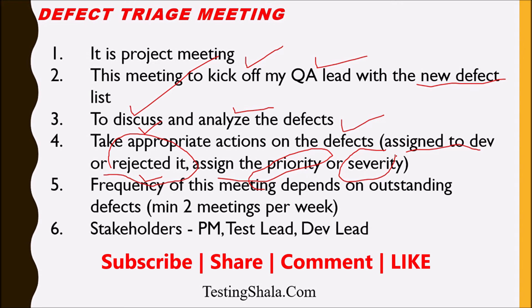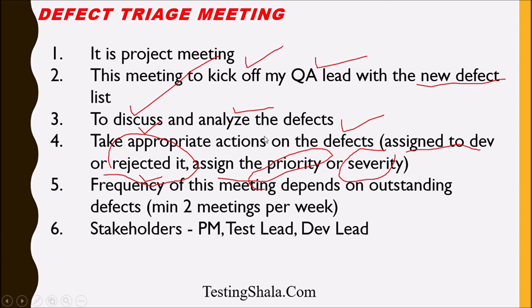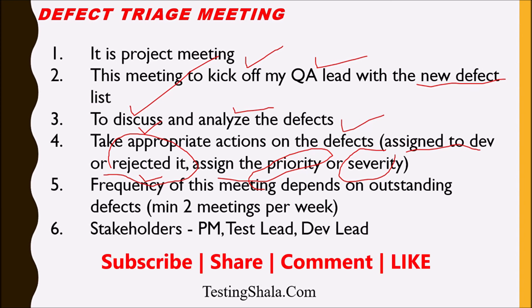The QA lead sends the new defect list to all relevant stakeholders. During the meeting, each defect is discussed and analyzed, and appropriate actions are taken for every defect. The frequency of this meeting is kept to the minimum required, and the main stakeholders are the project manager, test lead, and dev lead.